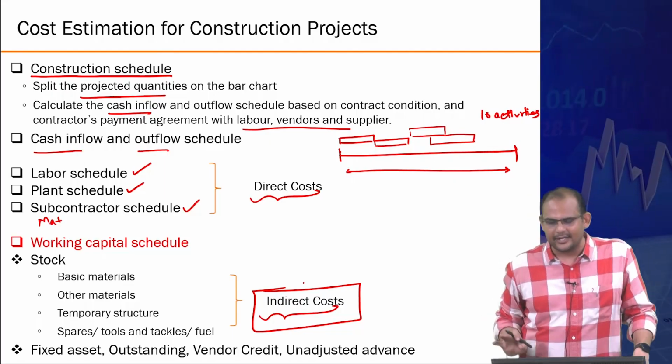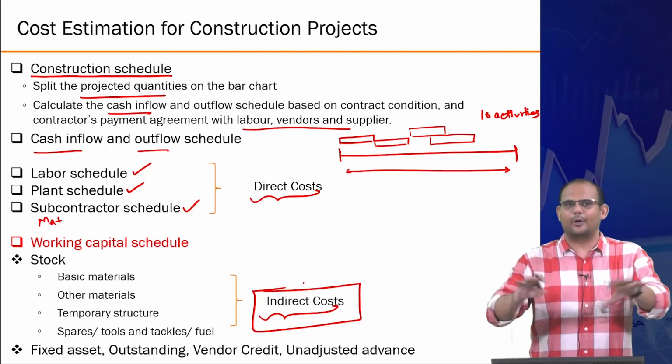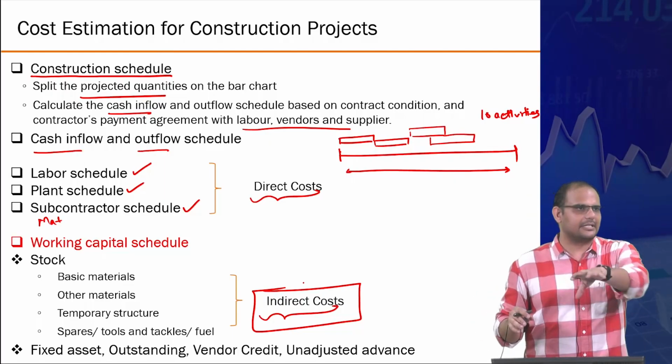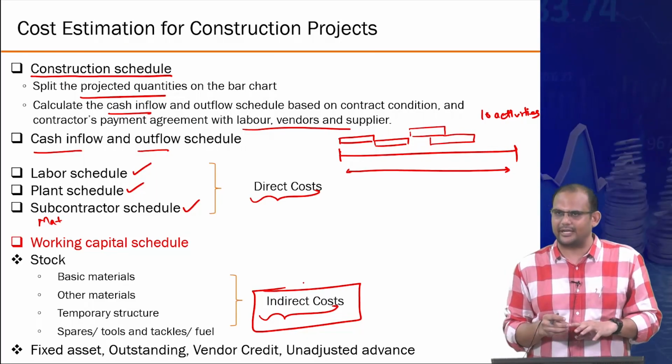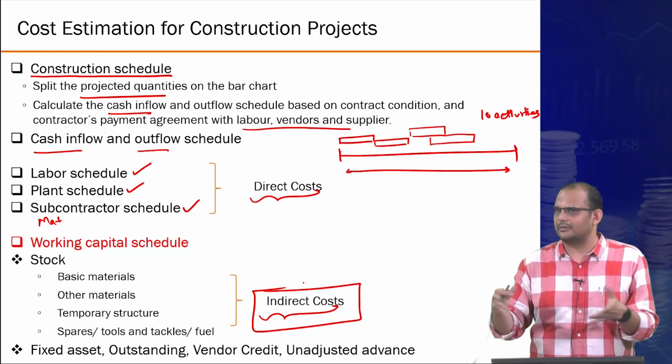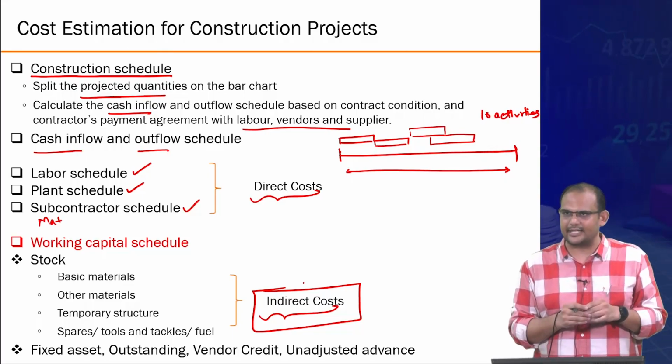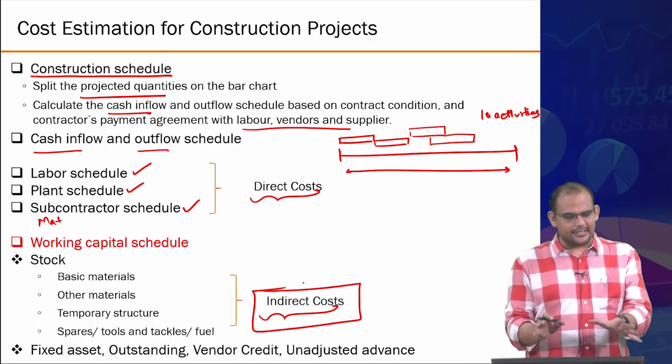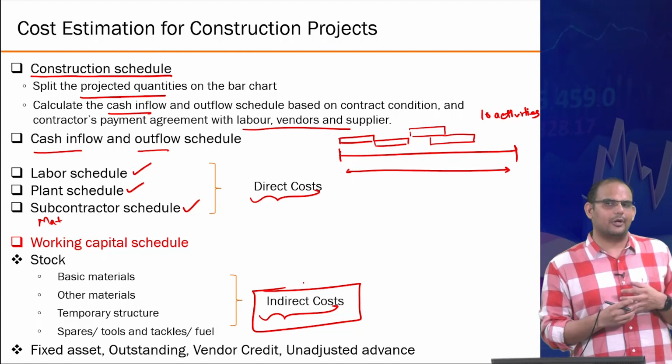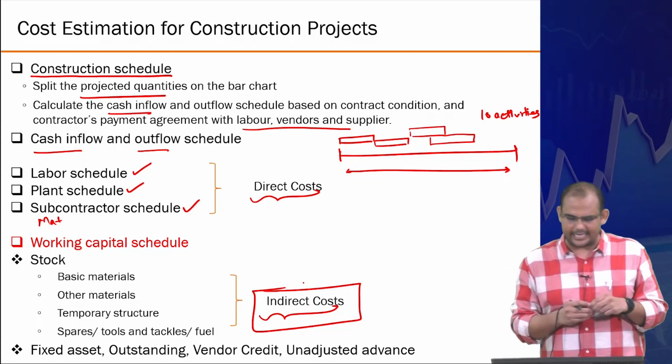You can't do that typically. So you say, okay, on an average 100 of these machines are input in my store activity. All of them will be distributed to some extent equally to the site and things like that, right? So that is your indirect cost which you cannot attribute to a specific activity directly.